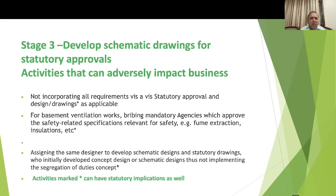Stage 3 is developing schematic drawings for statutory approvals. For example, in the case of basement ventilation, not incorporating fume extraction requirements and fresh air requirements is a critical risk. Assigning the same designer who developed the concept to also develop the statutory drawings again compromises segregation of duties. Items marked with an asterisk in this presentation have statutory implications.